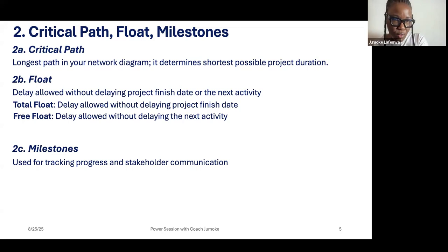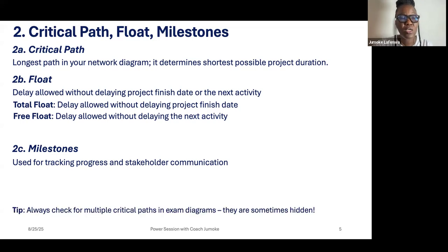You report to stakeholders. And you realize that you would have identified your stakeholders at the beginning of the project and analyzed the stakeholders. So you have your key stakeholders, you have engaged with them, you know their communication needs. That will birth the communication management plan. So you know how frequently you will be communicating with them, what format, what mode, and all that would have been established, and you have it in your communication management plan. And so when you are communicating, milestone is a form of reporting to your stakeholders.